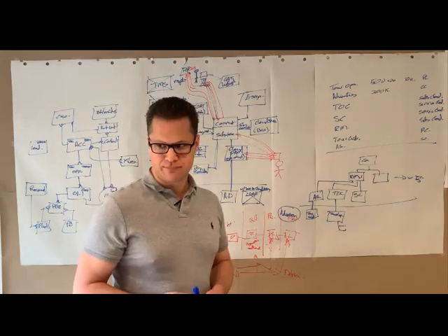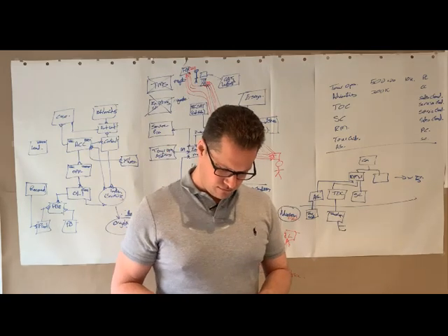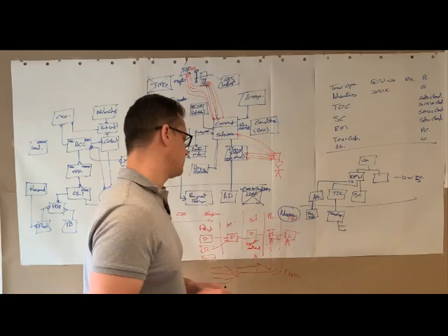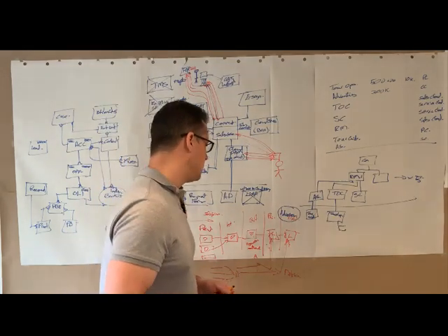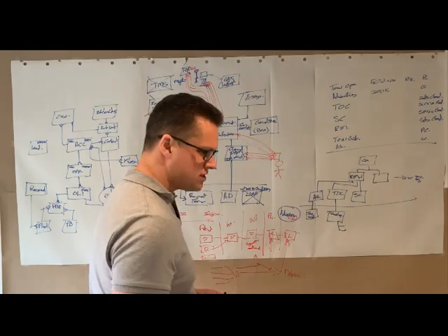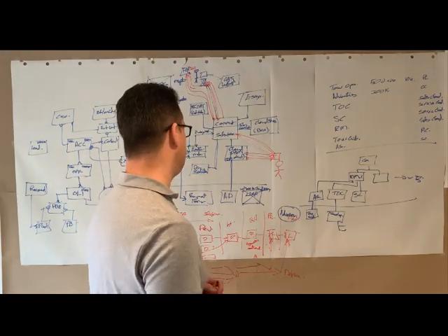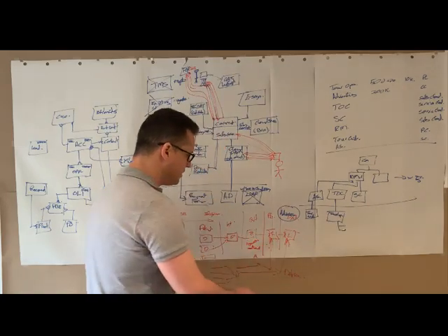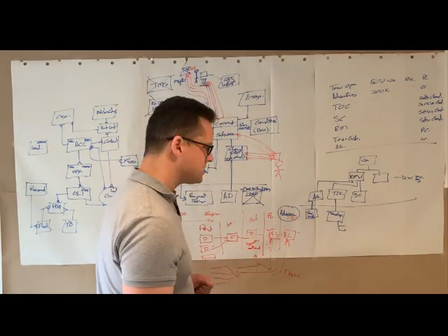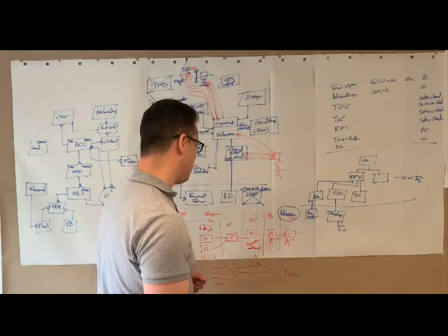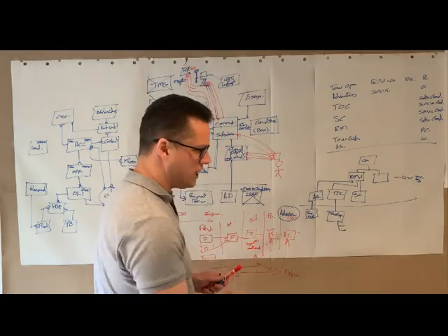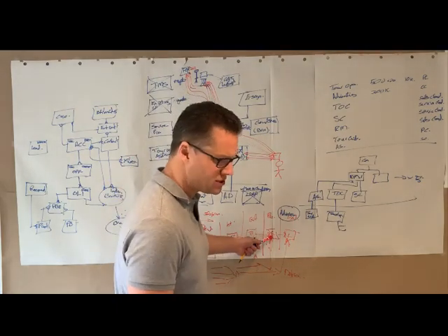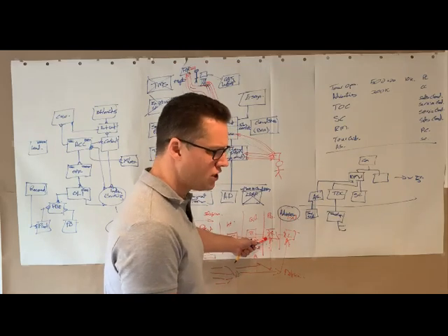And just finally as well, at which point do you see user acceptance testing and data migration taking place in this strategy? Yeah, so with reference to the phases as well, this is our life cycle once we're established. With the data migration project, for example, we would be looking ultimately to do testing of that in a full copy sandbox so that we could get timings for the overall data migration.